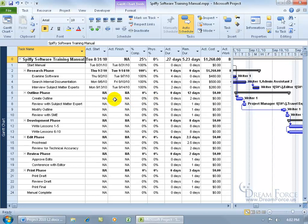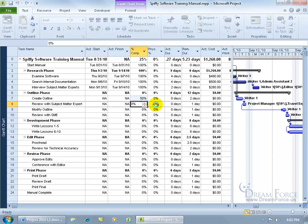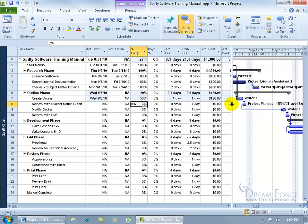Let's go ahead and do another one — let's complete this one. Instead of having it at 100%, if I come in here and type in 50 and hit enter, the black bar goes halfway, indicating that we're halfway through the task.